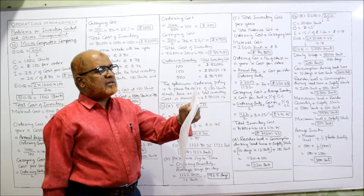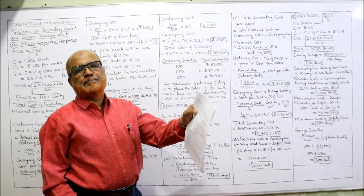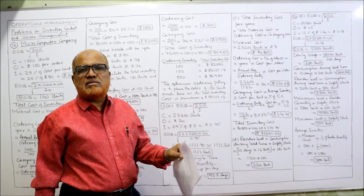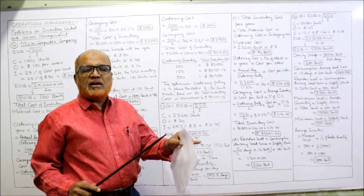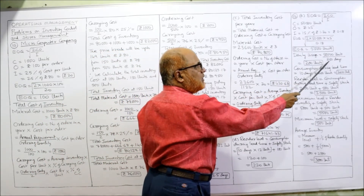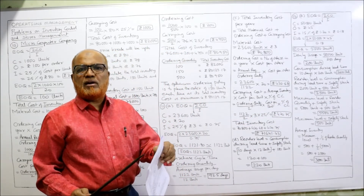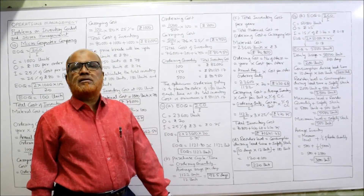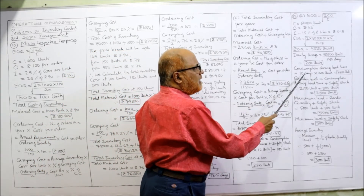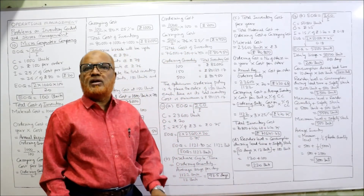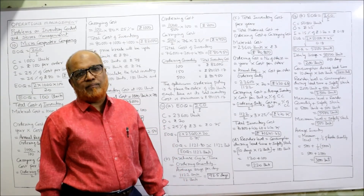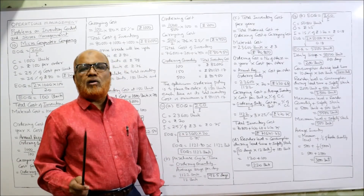If the company operates 250 days a year: daily usage = 50,000 ÷ 250 = 200 units. Procurement lead time is 10 days. Consumption during lead time = 10 × 200 = 2,000 units. Safety stock is given as 500 units. Reorder level = consumption during lead time + safety stock = 2,000 + 500 = 2,500 units.